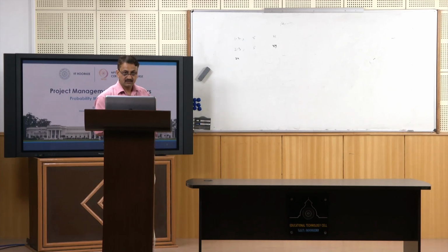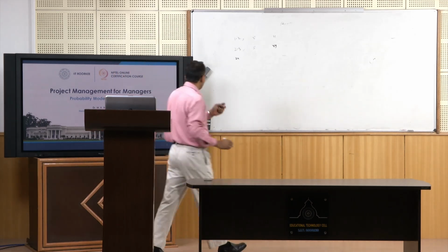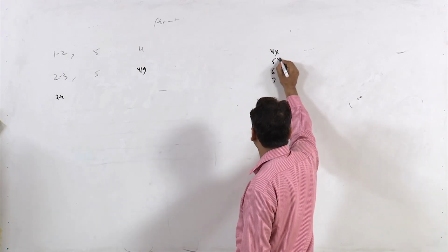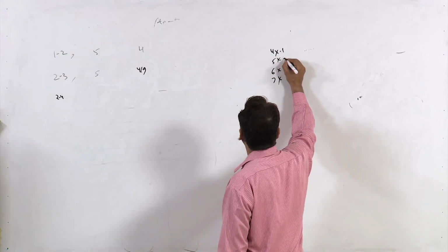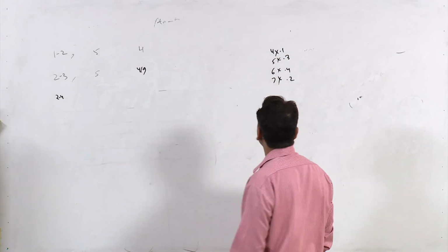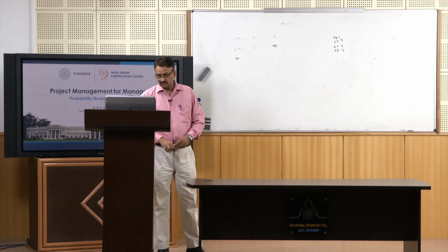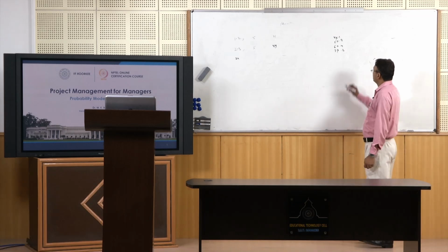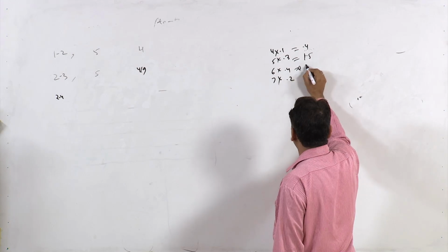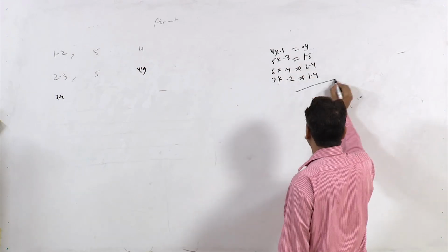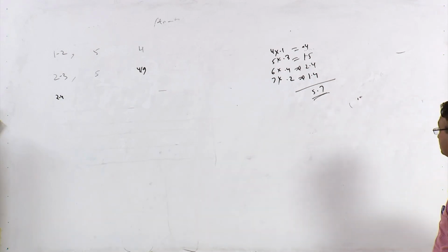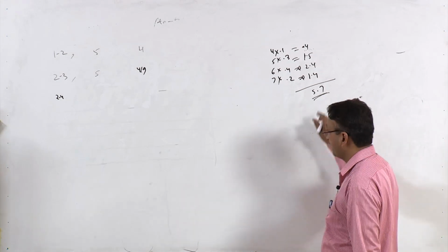So you need to find out the mean, the way in which we have just calculated in the previous example. So let me calculate the mean first. It is 4, 5, 6, 7, multiplied with their probabilities, 0.1, 0.3, 0.4 and 0.2. The total should be 1, right. So this is 0.4, 1.5, 2.4, 1.4. So this total is 5.7, right. So 5.7 is the mean.